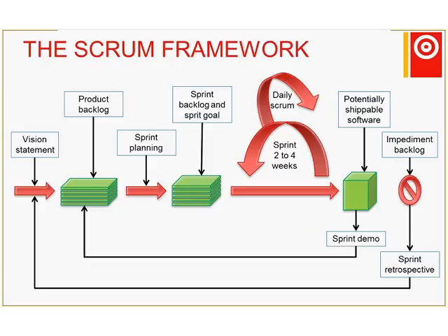If the duration is much less than 2 weeks, then the overhead of creating and managing sprints becomes unreasonable compared to the time available to do the work. If the time goes much beyond 4 weeks, then the sprint gets too big and people start forgetting what they've got to do in the future and forgetting what they've done in the past and how well it worked. 2 to 4 weeks seems to have become a good period for doing the work. And within the sprint, you have the daily meetings about progress and so on.